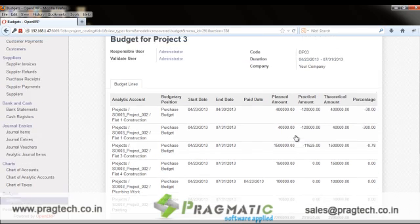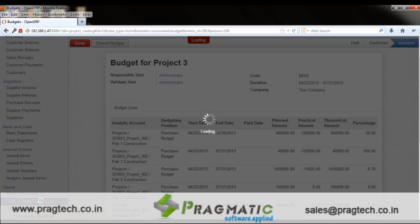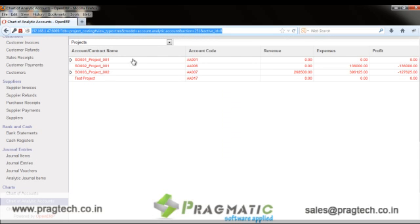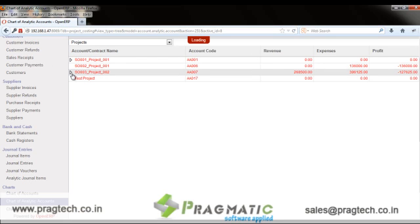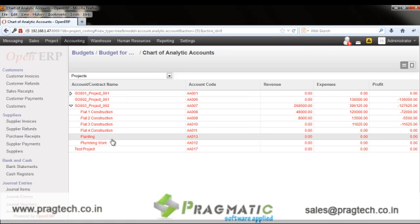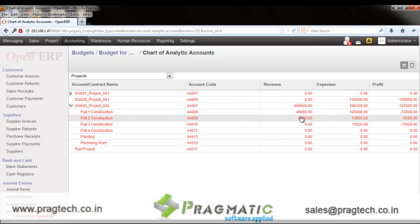This is how the user can monitor the budget for each project. Task-wise and project-wise profitability can be assessed through the chart of analytic accounts. This provides a summary of project-wise profitability showing project name, revenue, and expenses incurred. On drilling down, the user can see a list of tasks with revenue and expenses for each task, allowing profitability comparison at both task and project level.